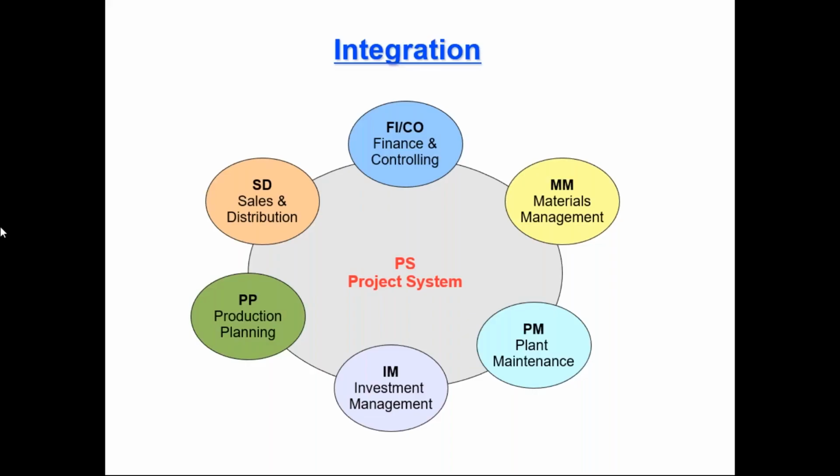See what is happening in the same example. When you are installing the machines, you are going to buy all these machines from your vendor, right? When these machines reach your premises, before even installing, they have to be inspected whether they are received as per the given requirement or not, whether the quality is up to the mark as mentioned in the requirement.